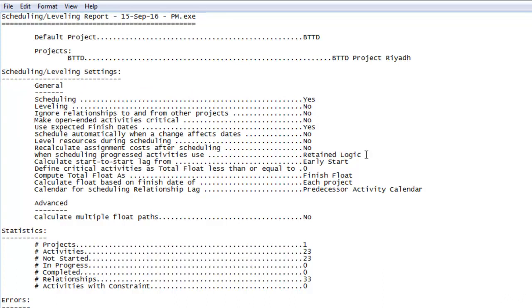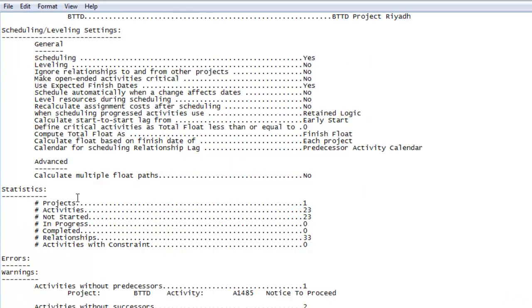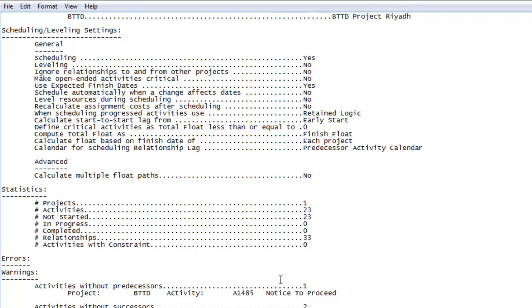It also gives us some statistics about the project, such as how many activities are present in this project, how many activities have started, how many activities are in progress, or how many activities have completed. And if there are any constraints in the project, it will also tell us from here.